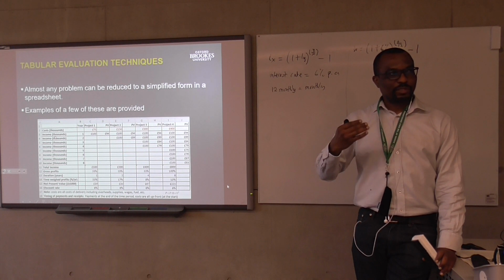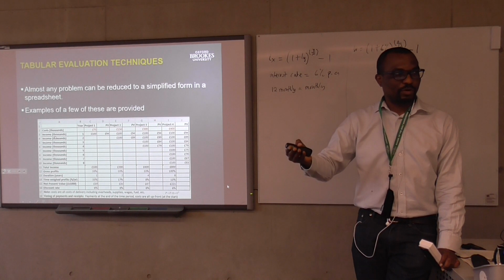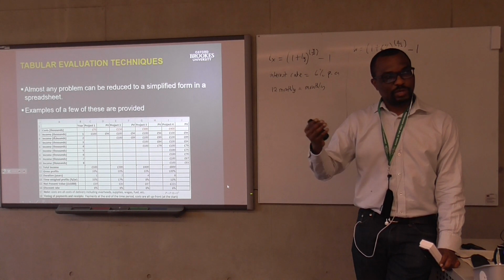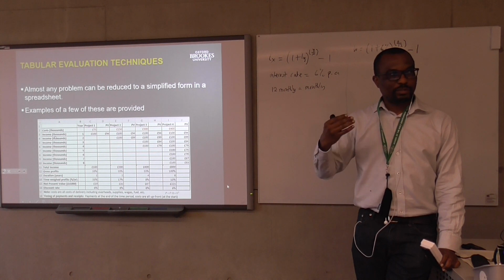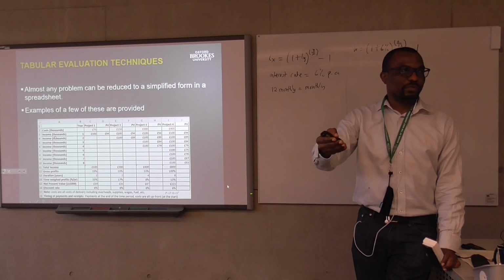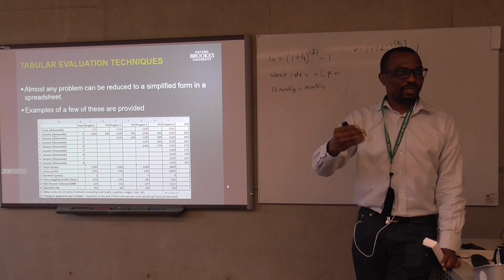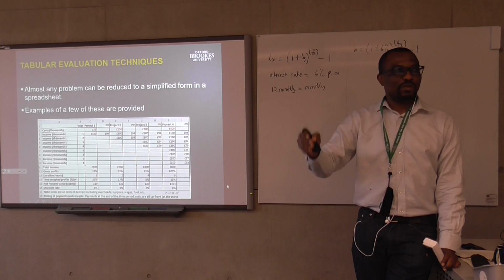So then how much is it that if I pay, you've also estimated your profit percentage you want to make. Maybe on that project you want to make 10% or 15%. So then you ask yourself, how much should I pay for this land to be able to make a profit of 10 or 15%? So the residual valuation helps you establish a maximum value you can pay for the land.